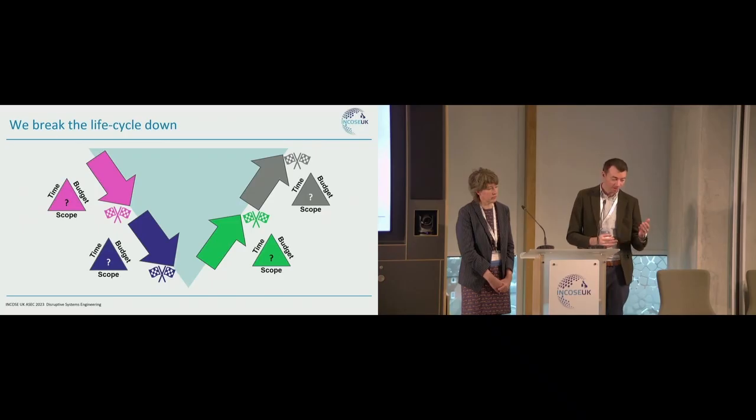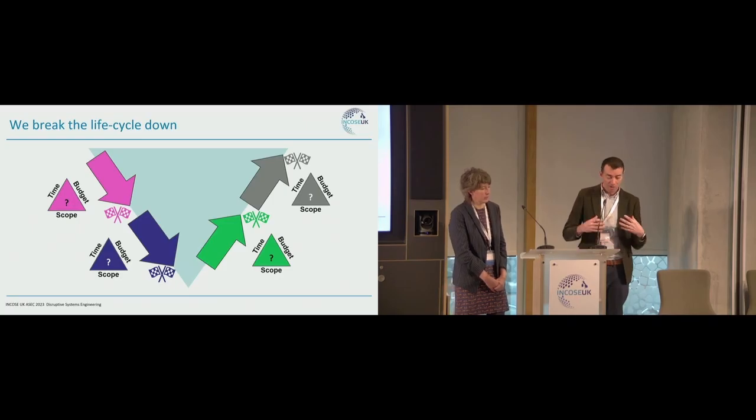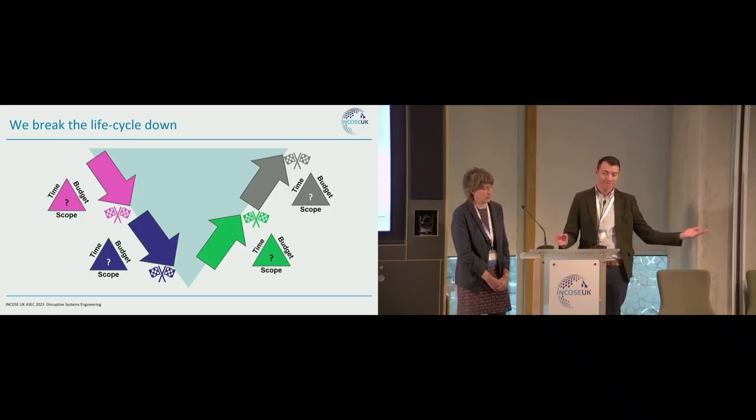We need to think about, if you're in the blue project team and you're receiving input from the pink project team, you need to be looking both upstream and downstream of what's coming into you and what you're feeding into. If you're looking at what's coming into you, we need to look at the work that they did, validate it. Even in some cases, you may need to plan redoing some of the work they did in order to confirm within your contract, within your team, that you're on the right path. You know you're at your true course, your true position in the project, and you know the work you're going to do is going to carry the project forward to its actual, ultimate objectives, rather than what was originally defined when statements of work and contracts were written how many years prior.